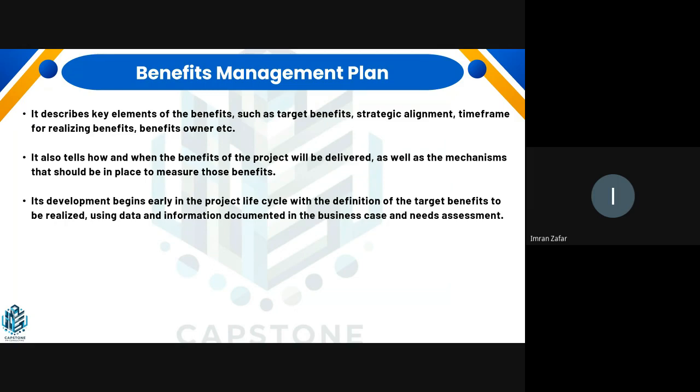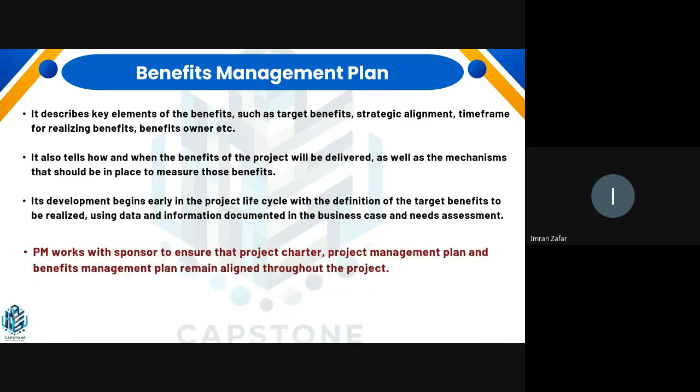And as you move with your project, you may need to develop some documentation related to, again, the training part, for the operations team or the users who are going to use it. So the benefits management plan will tell you how you are going to sustain those benefits beyond or after the completion of your project.